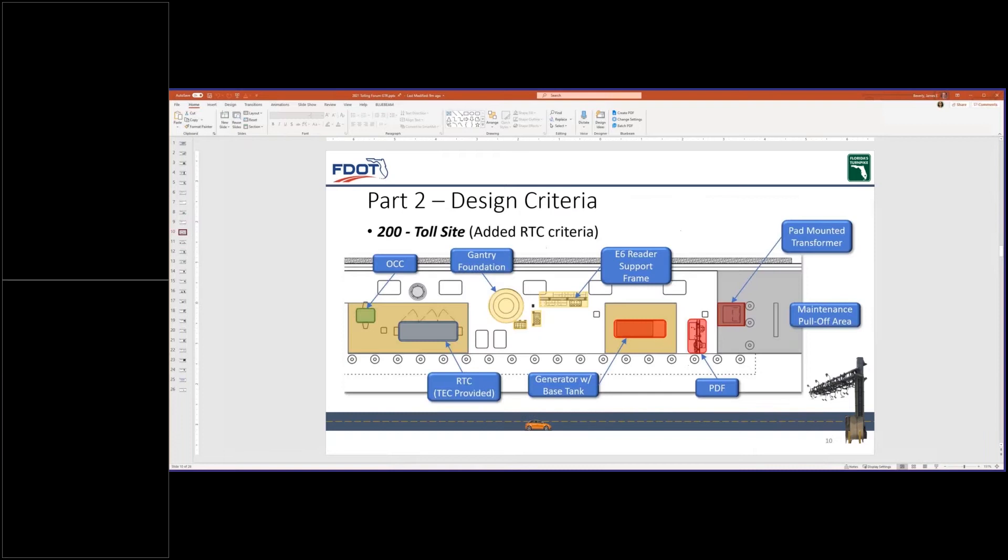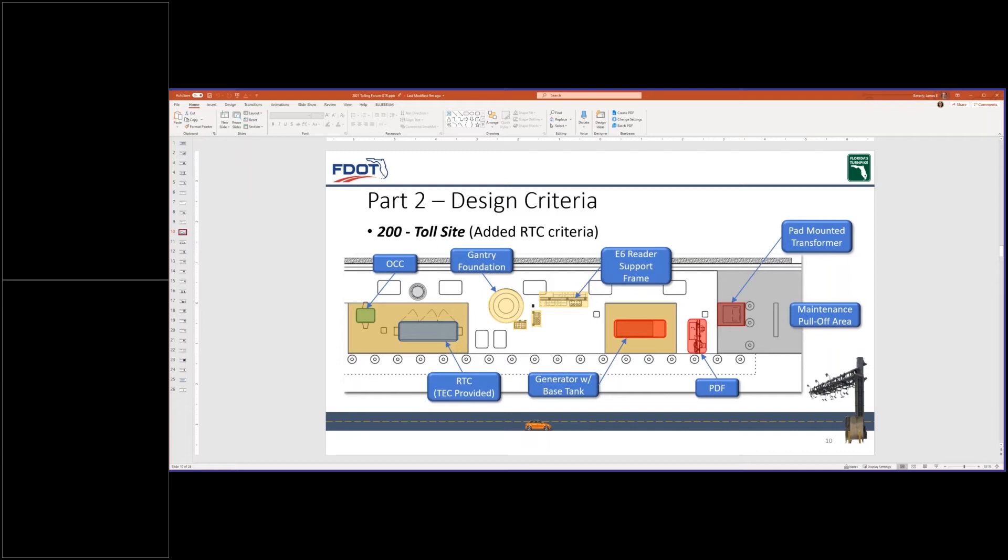The RTC site layout is shown for reference. This site is significantly narrower, 16 feet wide, versus the 24 foot 6 wide currently needed for the toll equipment building layout. The RTC will be provided by the TEC vendors, all other infrastructure will be by the contractor. So just the cabinet will be provided by the TEC and everything else will be provided by the road site contractor. This design will eliminate a toll equipment building permit and associated shop drawings. The generator will be combined with a base fuel tank since the power loads have been significantly reduced. The primary power service at each RTC toll site will only require 200 amps, rather than 400 amps for toll equipment building toll site. The maintenance pull-off area has been reduced to one maintenance vehicle width, allowing for two vehicles to be parked in parallel, safely behind a concrete barrier.